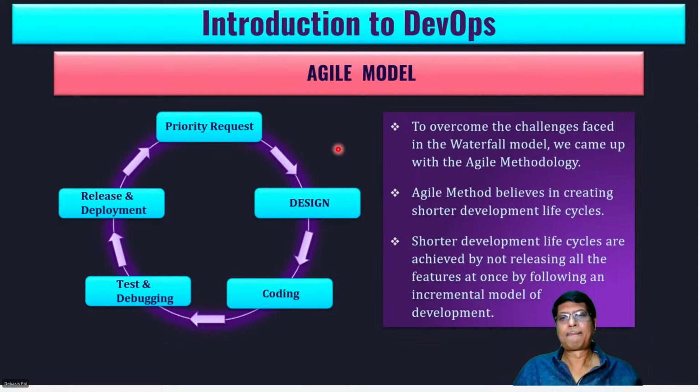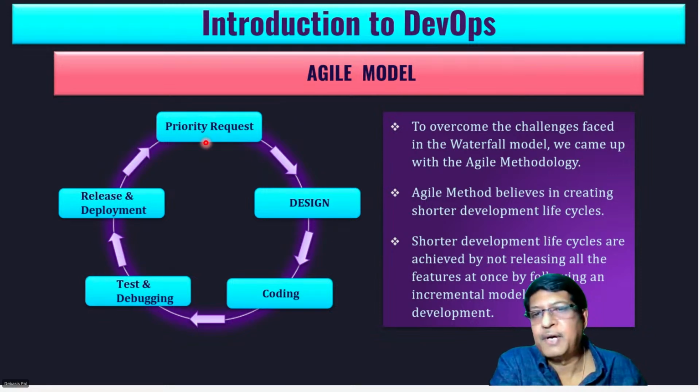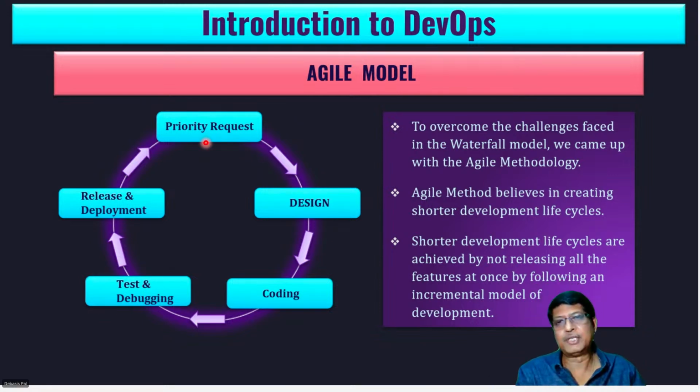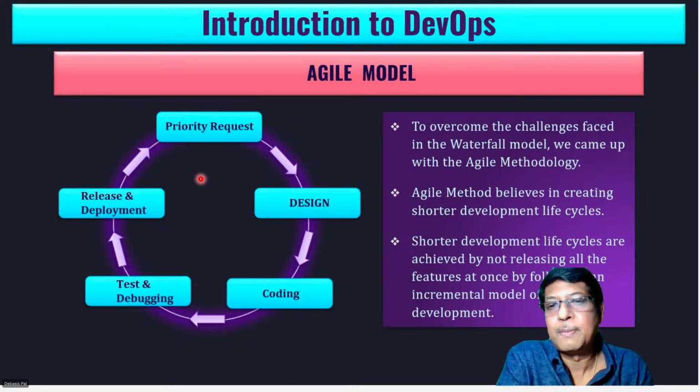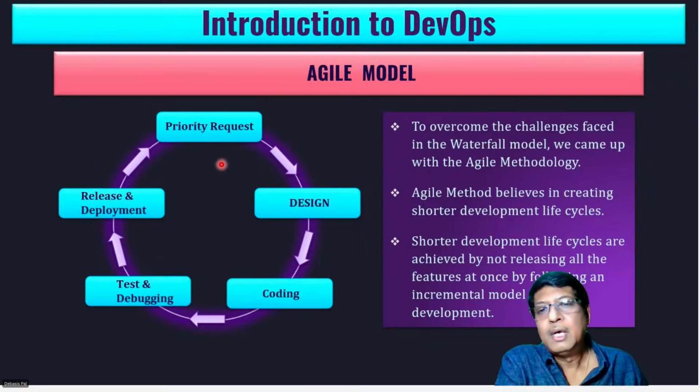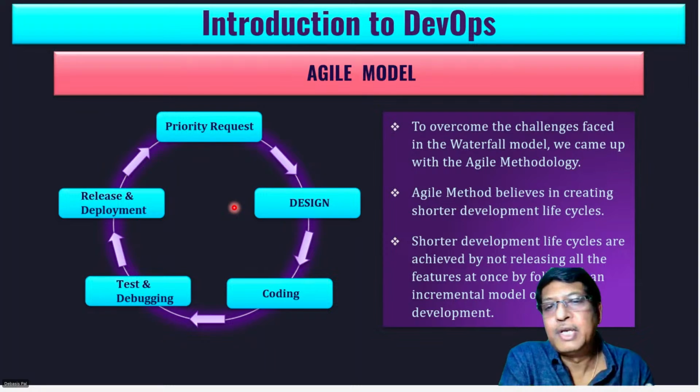Clear? So you pick up the first 5 very important features from the backlog that are required by the customer. Here the customer is designing the bucket for you. The customer is saying that I need these features. And in the long run, after the 1 month, the bucket can be modified because a few of the requirements will come up the ladder because they might be priority.